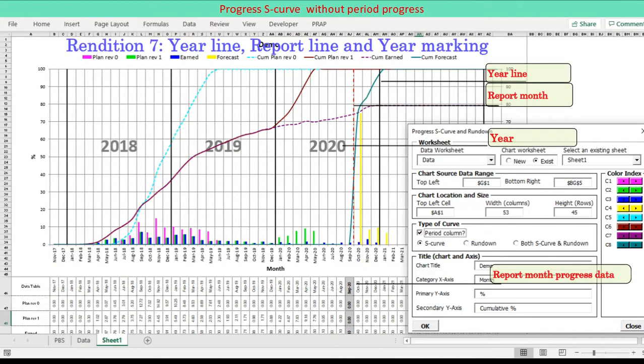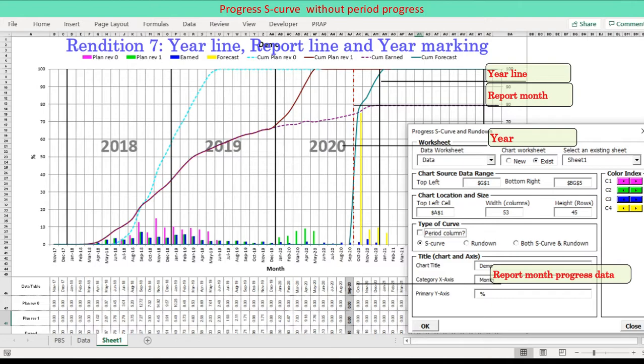Year vertical lines and report month line are added. Error bars function is programmed to do so. Year marks are added in the chart. Report month line is added. Report month data highlighted.